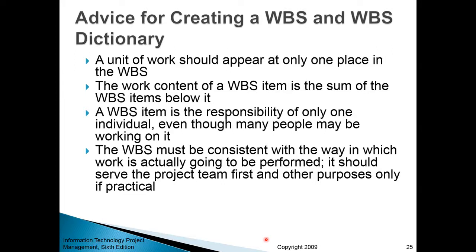Some general best practices when creating work breakdown structures and WBS dictionaries: first, a unit of work should appear at only one place in the WBS. If you duplicate work in different areas, you're wasting resources, and there can be conflict because different people may do the same task in different ways, creating confusion.